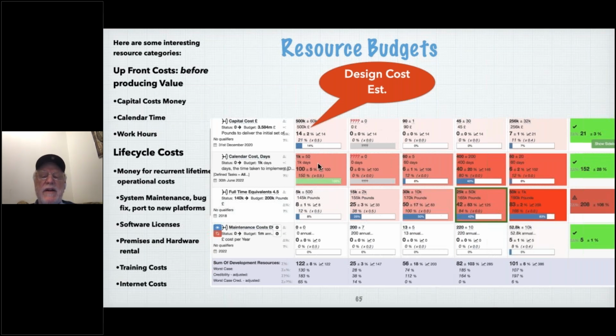0.5, pretty good credibility, 0.5. Here's a lot of zeros, 0.5. Zeros mean we really don't know what we're talking about. It's actually a quick student exercise on a BCS course, so nobody's had time to research the capital costs for this. But they've made a wild guesstimate of 45 plus or minus 30, but it's not backed up by anything substantial. So if management wants to be certain they're not going to blow their budgets, they need to give the designer more time to find out what this costs and get a higher level of credibility before we proceed using it.